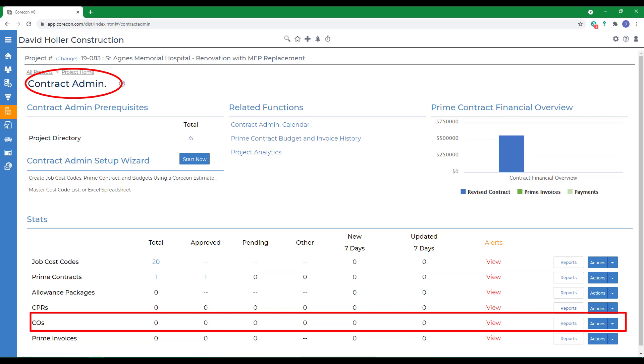Before we show you how to create Change Orders or COs, there's a few things to keep in mind. A Change Order has several status options. They occur in the sequence draft, pending submission, pending, not approved, or approved.